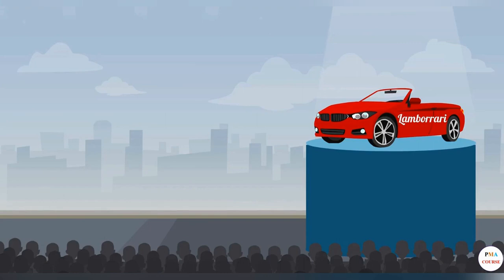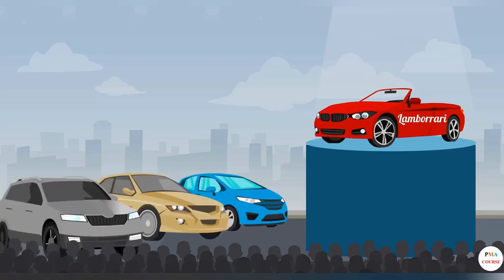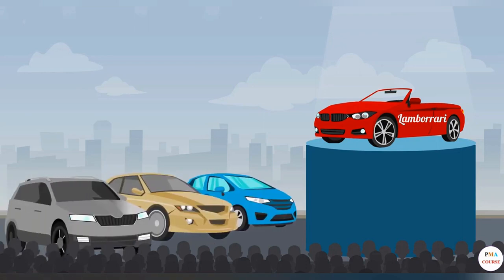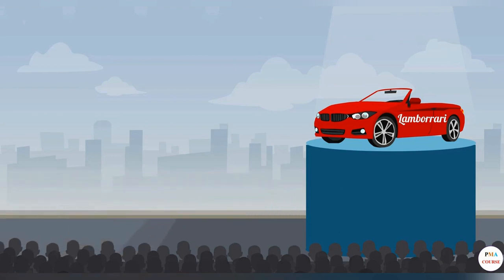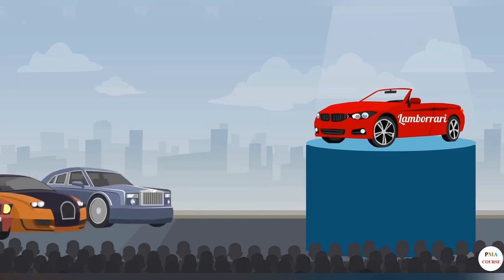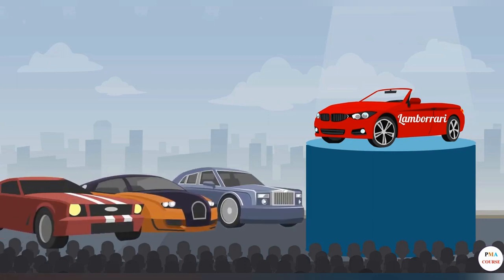Perhaps one of our stakeholders imagines our showroom to be targeted towards families, so wants more saloon cars to be showcased, while another knows that luxury sports cars sell very well in this part of the city, so expects more of the cars to be two-door convertibles. Or maybe the sponsor believes the hiring of staff is outside of the project scope, while the stakeholders believe the project is not complete until the showroom is physically open for business.